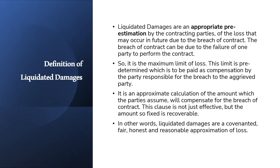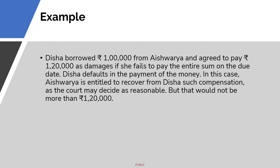In other words, liquidated damages are a fair, honest, and reasonable approximation of loss. For example, Dishof borrowed 1 lakh from Aishwarya and agreed to pay 1 lakh and 20 thousand as damages if she fails to pay the entire sum on the due date. Dishof defaults in the payment, so Aishwarya is entitled to recover from Dishof such compensation as the court may decide as reasonable, but not more than 1 lakh and 20 thousand.